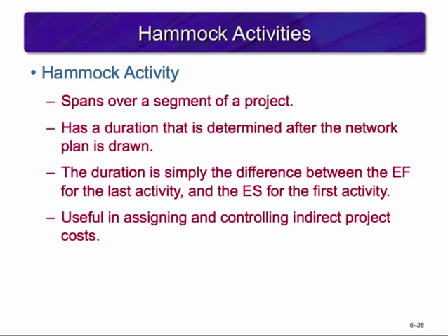HAMMOCK activities derive their name because the activity spans over a segment of a project. The HAMMOCK activity duration is determined after the network plan is drawn. They are frequently used to identify the use of fixed resources or costs over a segment of the project. Typical examples are inspection services, consultants, or construction management services. A HAMMOCK activity derives its duration from the time span between other activities.